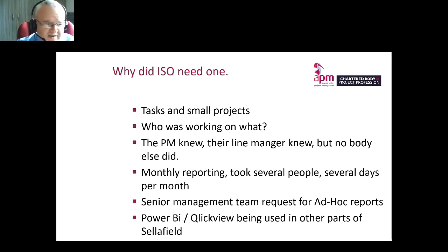Well, the systems weren't really configured to do that, and often all the tasks within ISO would just appear as one bar on P6, and it would be managed at that level, because compared to all the other projects, it was relatively small. It's still significant, we are talking hundreds of millions of pounds in total, but relatively small compared to the £2 billion a year that we currently have as our project portfolio.